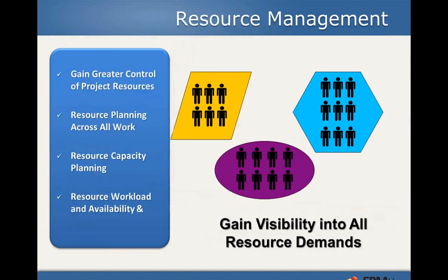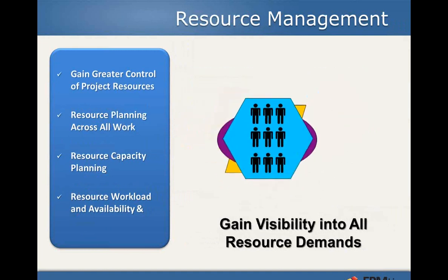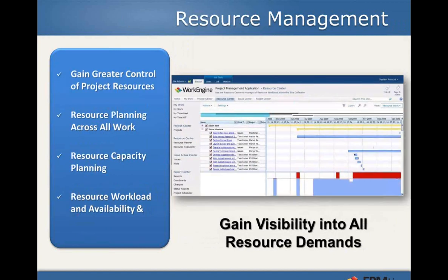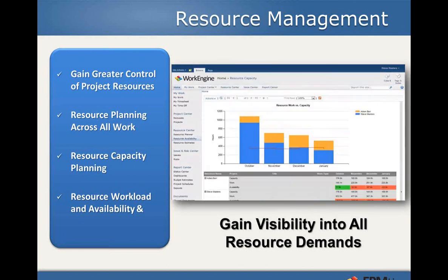And then the resource management piece, as you gain visibility into all the resources across the work that you're working on, we actually maintain a central resource pool within SharePoint and allow you to look at a resource or a group of resources and see, based upon what's assigned to them, no matter what type of work it is, how that impacts their capacity line and see if they're over or under taxed at any given point in time. And we have all kinds of reporting around this as well to get as granular as you like.